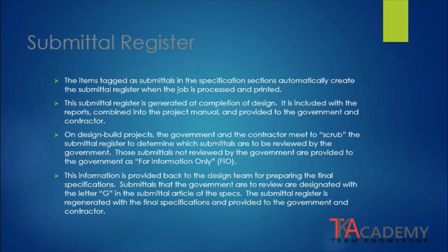The submittal register is one of the more important items that is generated by Specs and Tact. It is a log of all the things that are to be submitted during the project. The items tagged as submittals in the specifications sections automatically create a submittal register when the job is processed and printed. The submittal register is generated at completion of design. It is included with the reports combined into the project manual and provided to the government and the contractor.